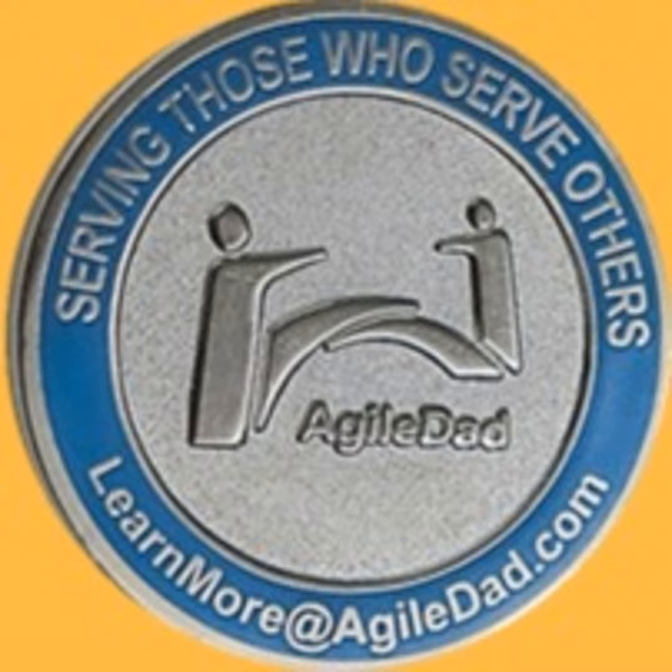So usually I say number one is dependency. Number two is if it's not necessarily a dependency, but it's something that we have to get done to fit something into a sprint. So the way I word it is if a team can do 20 units of work and you're booked up to 18, you might have to skip across categories, find another two.